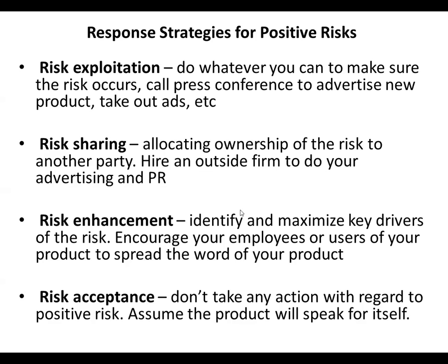When you look at each of these strategies, you can see it is actually expected to enhance risk occurrence or the effects from the risks. If you look at risk exploitation, we're trying to exploit the risk. Do whatever you can to make sure the risk occurs. So let the risk occur. We are trying to maximize the occurrence. Call press conferences to advertise a new product, take out ads, something like that.